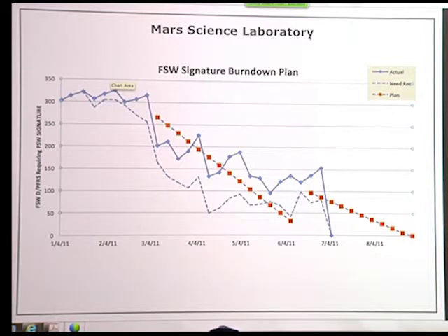We had, in the end, across the whole project, 17,000 issues in our internal tracking tool and 1,700 or so in the external institutional tool. But they were coming in faster than we could close them out. And this is actually a net chart of how we were just burning down 300. But by the end of this picture, there was probably another 1,000 issues that came in.